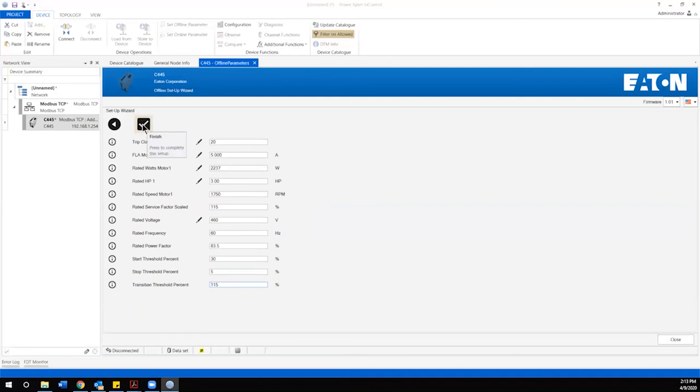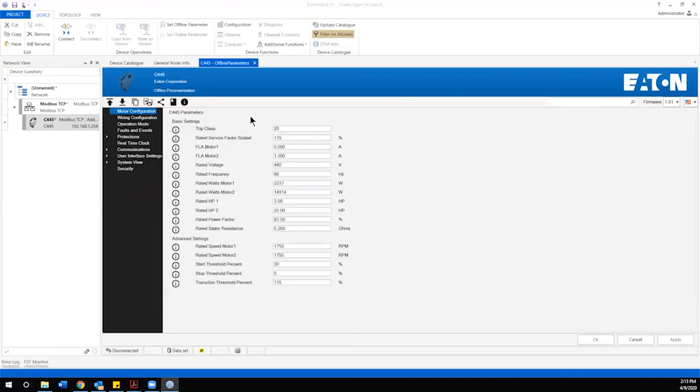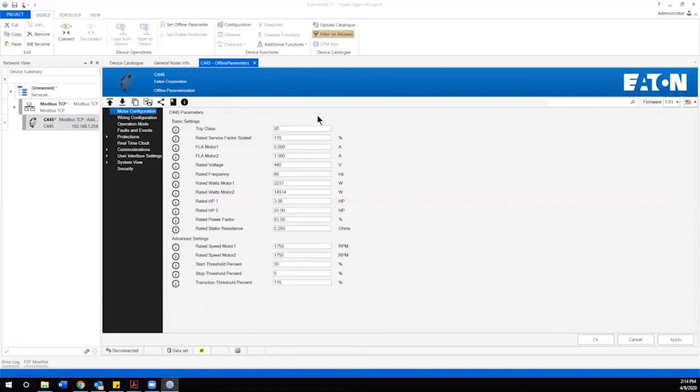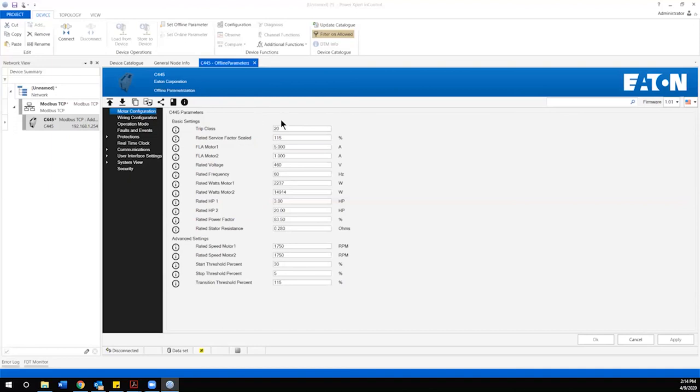Once we verified those parameters and set them to the nameplate values we would click finish and we'd show the configuration file with those values that have been established. At this point all the basic necessary information has been generated in the file to commission and start this application through the C445. In my case here I'm generating this file in an offline environment which is typical for commissioning large systems with multiple smart relays in them such as a large MCC. We would generate an individual file, a configuration file for each of the C445's in use in the system to save those for a point when the equipment is delivered and powered up then I could utilize the software to connect locally or through a network connection to upload these configuration files into each of the C445's for commissioning operation.